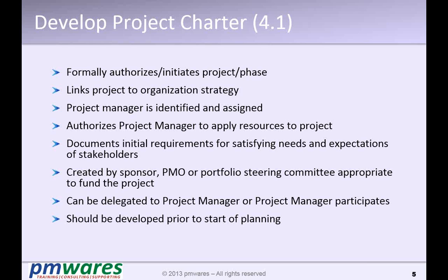A project is normally taken in a strategic way. So there is a strategy of the organization under which this project is being undertaken. The project charter contains the objectives of the customer and of the organization, and how that strategy is linked to this project comes from the project charter. It is normally created by a senior person, normally a sponsor who is actually providing funds for the project. It could be a unit head, the CEO of the organization, or anyone, but should be senior enough to have control on the resources of the project.